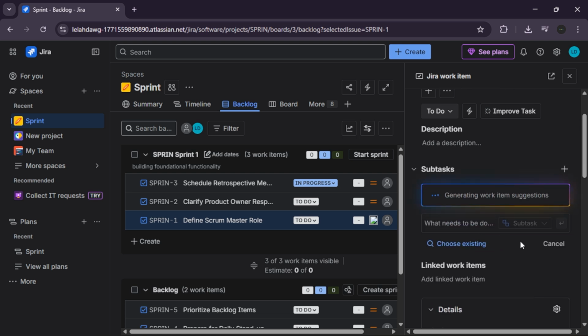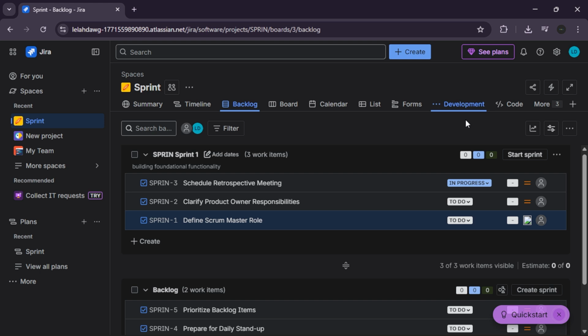Step 4. Launch the sprint. We are finishing with the commitment. This step locks in your scope and transitions the team from planning into the active execution phase. Ensure all story points are estimated and the team is ready to commit.